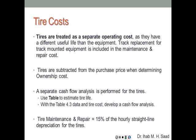Tires are treated as a separate operating cost because they have a different useful life than the equipment. A loader may operate for 10,000–20,000 hours, but tires must be replaced regularly. Tire costs are subtracted from the purchase price when determining ownership cost, with a separate cash flow analysis for tires. A table estimates tire life by equipment type and operating conditions — for example, hauler tires last about 3,200 hours under average conditions but only 2,200 hours under unfavorable conditions. Tire maintenance and repair is 15% of the hourly straight-line depreciation for the tires.